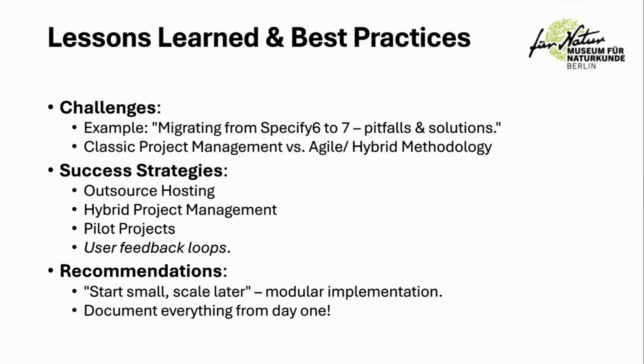Another challenge was shifting our project management approach. Initially, we planned to work on each collection one at a time, but this quickly led to bottlenecks. To address this, we switched to a more agile, flexible process using these checklists. This way, if we are waiting for feedback on a task, we can move forward with other tasks or even another collection.